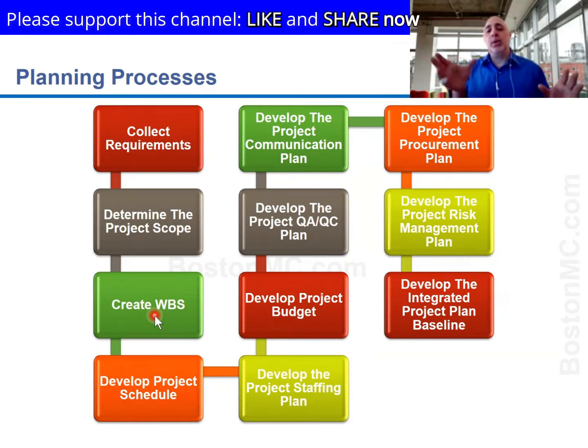So the WBS is an organized way to take the total deliverable of the project and break it into nice little structures so that we can plan out the activities associated with every piece of the work. So for example, the whole project is going to be the whole move, but in the WBS, there will be the packing and unpacking, the IT, maybe the electrical or infrastructure of the building. The other one will be the legal or logistics. There are different subsections of the final move project that I need to analyze.